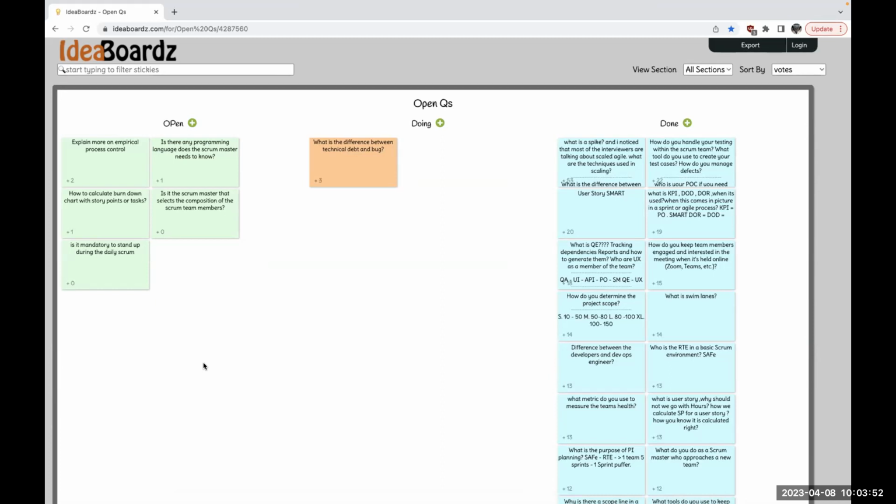The more fake responses you accumulate, the more technical debt you're creating. Technical debt is extra work you've created for yourself, but only so you can move forward and come back to it when the time comes. The key is you don't create so much technical debt. Usually companies will have, I don't know, 2 to 3% of the work as technical debt. You don't want more than that because you're creating so much unnecessary work. So you only create technical debt if you really must, because you can't move forward. Does that make sense?